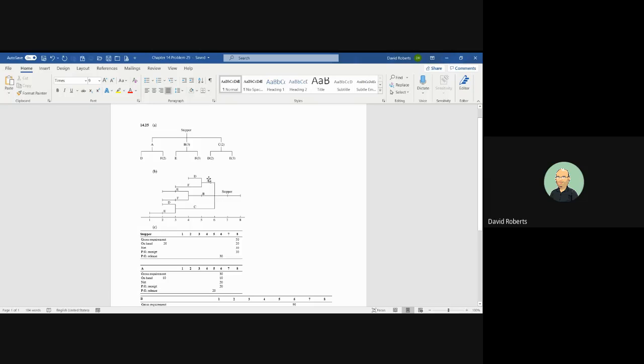So you better have all the components in week 6. You back A up by the lead time, which A has a lead time of 1. B gets backed up by the lead time of 2. And C has a lead time of 3.